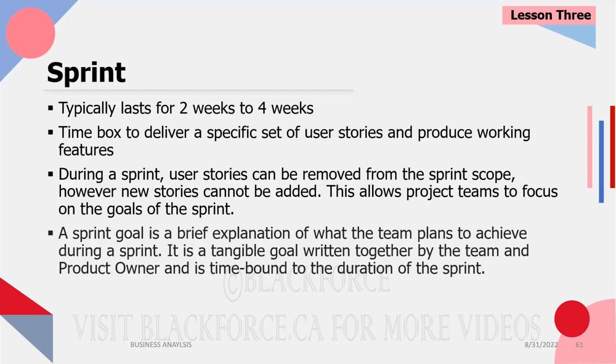If for any reason we're only 90% done by the end of the 2 weeks, whatever is left, we're moving it out of that sprint. That sprint must end on the last day of the 2 weeks. And if it's 3 weeks or 4 weeks, whatever the organization is doing.